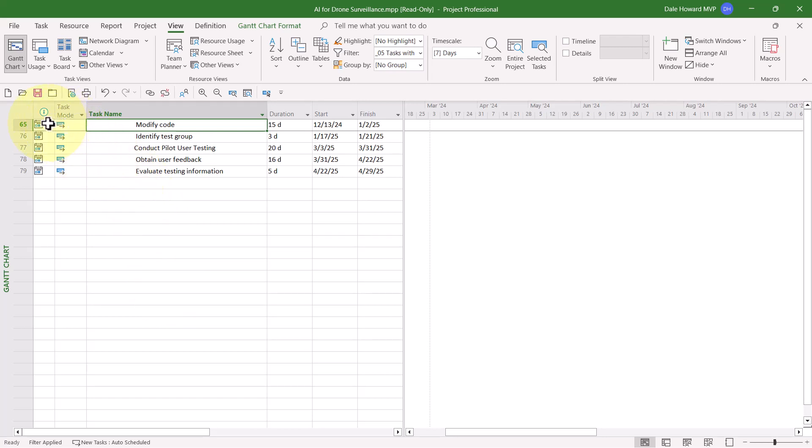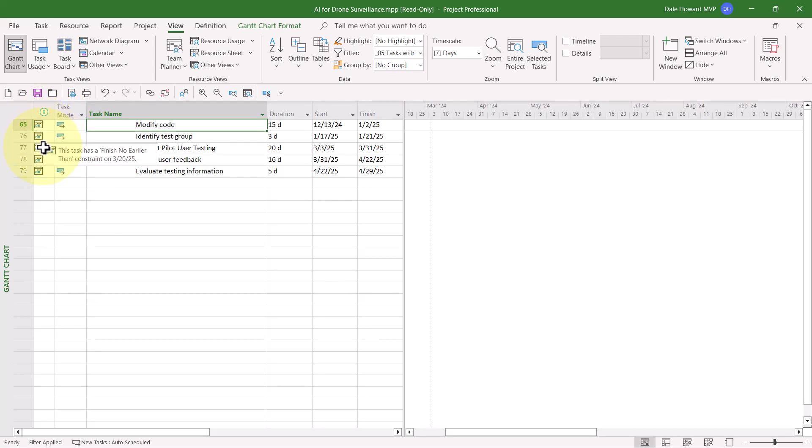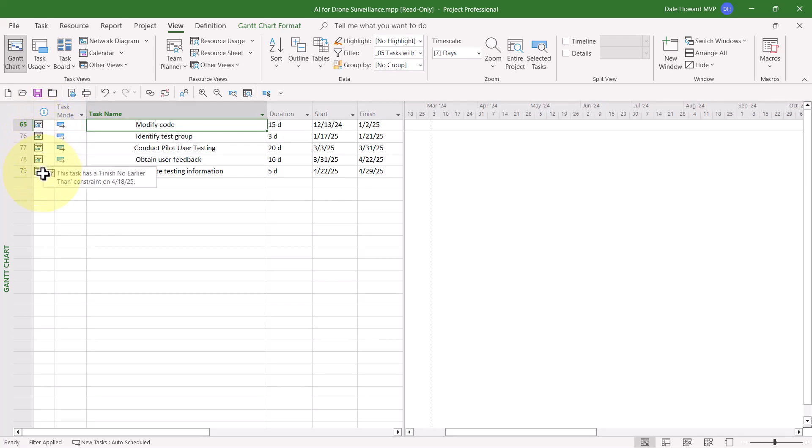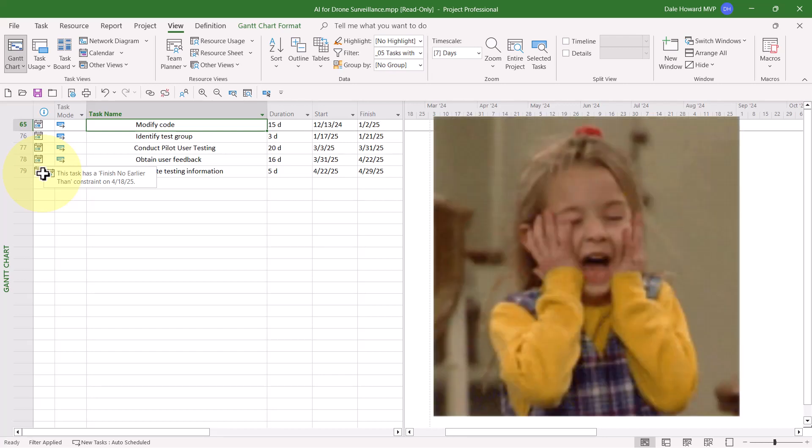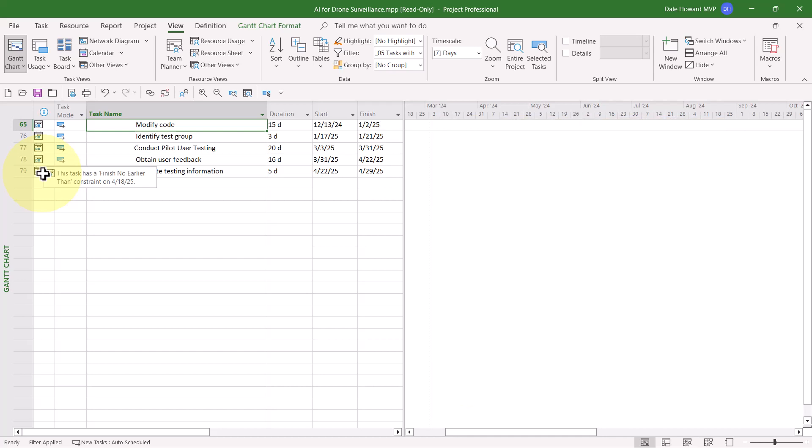So notice these tasks are all finish no earlier than. Look at that. That means the project manager who created this project probably manually typed both a start date and a finish date, or, at a minimum, typed a finish date for each one of these tasks. Those constraints need to be removed.